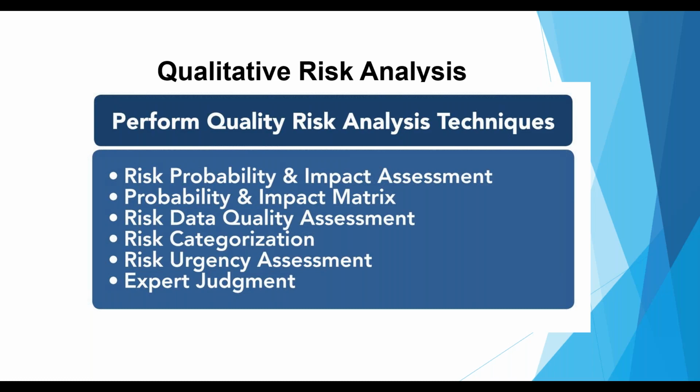You need to assess each individual risk using qualitative risk analysis and evaluate the probability that each risk will occur and the effect of each individual risk on the project objective. These are all subjective, not based on data analysis, facts, or the scientific method. These are subjective risk analysis techniques. That's why it's called qualitative.